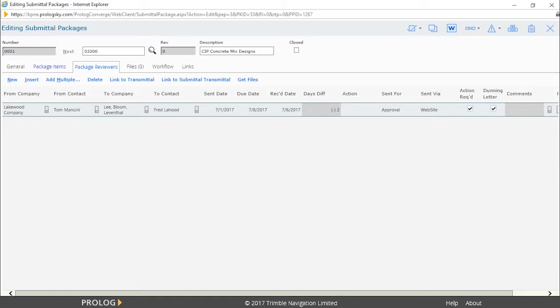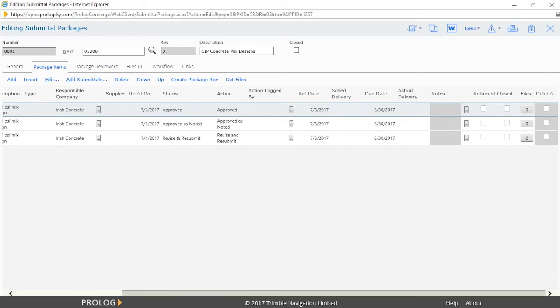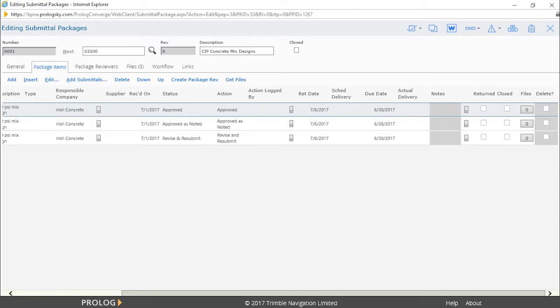Fred has responded, indicating that two of the items in the package have been approved or approved as noted. The other one needs to be revised and resubmitted.